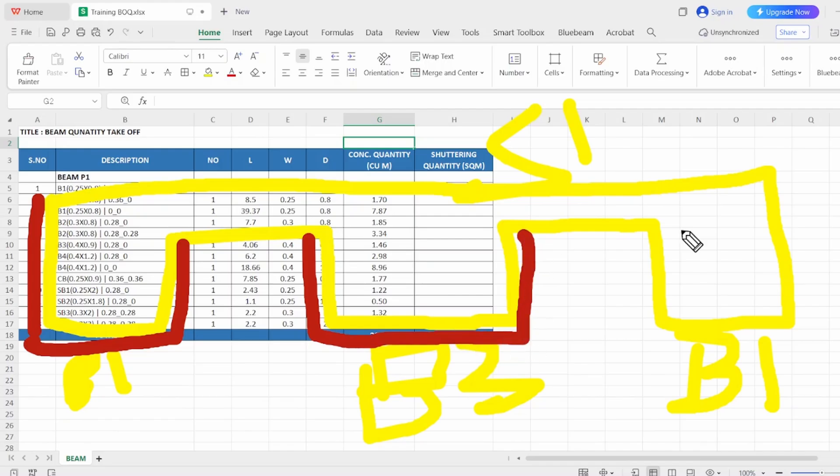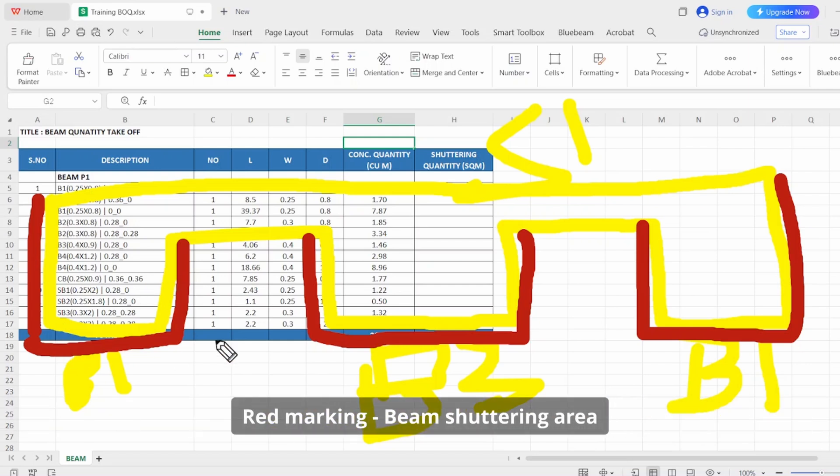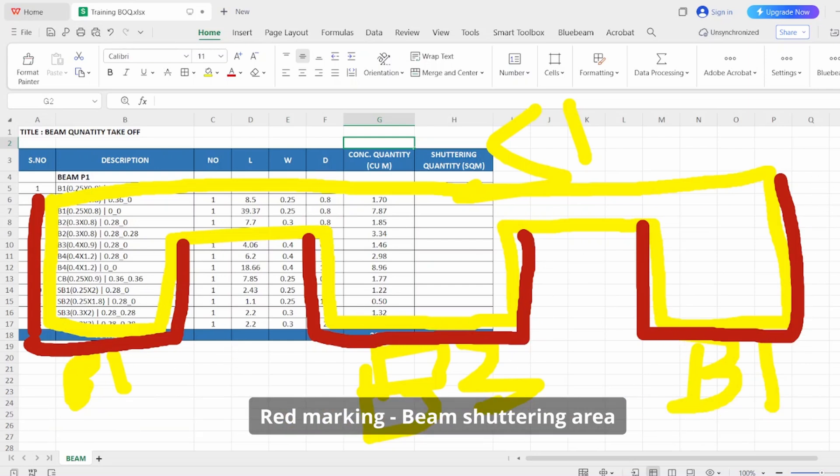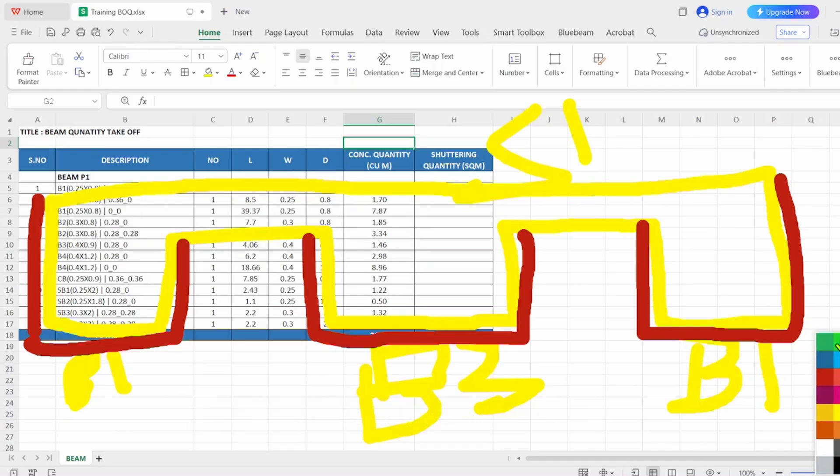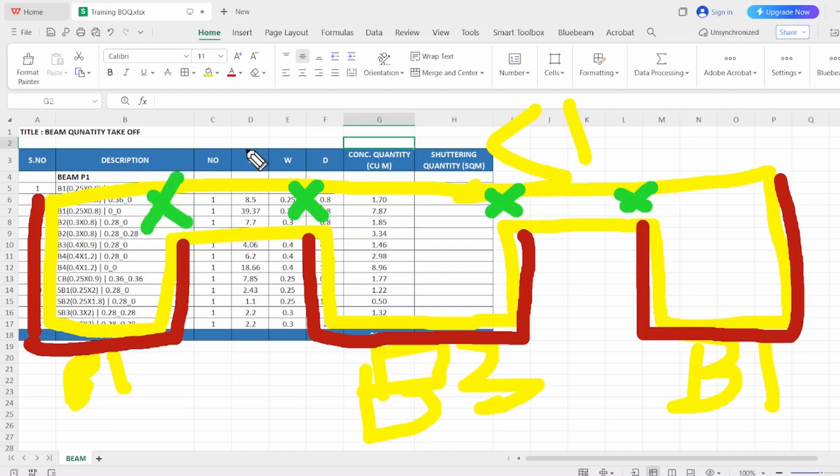These are the portions we need for the shuttering, right? These are the portions which required for the beam, right? I hope you understand this concept. So these are the formwork or shuttering area for the beam. So here you can notice these items are not calculated for the shuttering area, right?